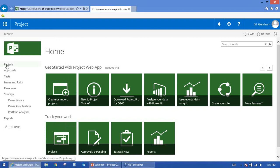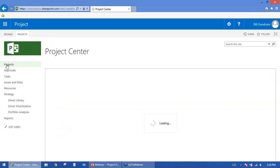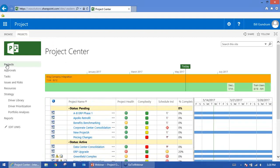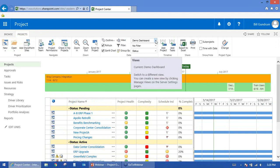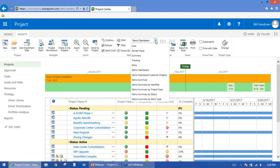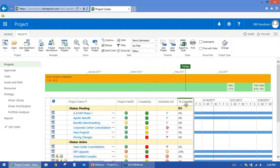Clicking on Projects takes us to the Project Center — this is the portfolio of all our projects. It gives us a one-line entry for all the different projects loaded to the portfolio. Different views are available showing different types of data: Top Cost, Earned Value, Summary, Tracking, and Work are the out-of-the-box views that come when you first sign up with Project Online. Additional customized views with a 'demo' prefix show fields we've chosen to display. It's similar to Microsoft Project — we have a Gantt chart on the right and data fields on the left. You can also create enterprise fields specific to your organization.